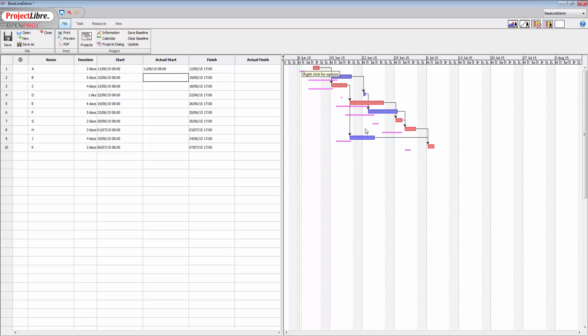And we can still see this baseline information here, so we can see there that the net result of all of our changes has pushed out the project to this point in time here. Now we can do other things as well.